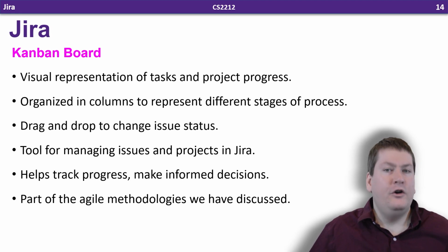Kanban boards in Jira are normally highly customizable, allowing you to create columns that represent your specific work process. In our case, however, some of these configuration options require administrative rights to change, so most teams will be using the default Kanban board setup. On the Kanban board, you can change the status of an issue by simply dragging and dropping it into the appropriate column. This makes it easy to see what work is done, what work is in progress, and what work is yet to be started.